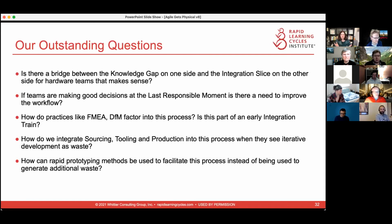And so a well-organized innovation process is, as you probably know, an escalating series of hurdles. In an early phase would be very, very fast, just a very, very quick investigation, sometimes just three learning cycles long, just to very quickly investigate an idea. In the next phase, they might get a little bit more time. They might get 3 months to investigate. Then in the next phase, they might get a little bit longer. And at each point, the hurdle to get from one phase to another is higher. And rapid learning cycles are how you get from one hurdle to another until you get into the more execution-focused phases of development.